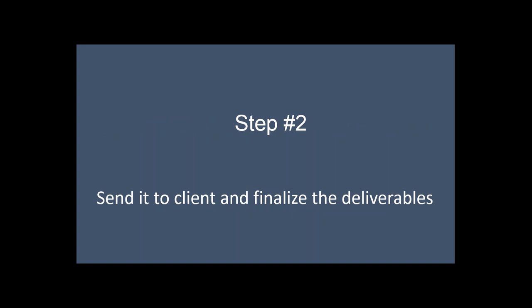Send out an email to the customer and finalize deliverables. Get the confirmation from him. And one thing I just want to tell you, never ever get this confirmation on phone. It's not going to work. You have to get this confirmation on email so that you will have proof.